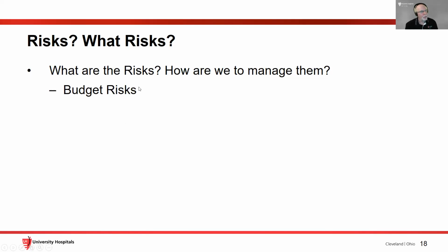But it's just a matter of having a very good handle as early as possible to understand what the budget needs to be and to mitigate the risk of going over budget, again, simply by being as well ahead of the curve as we can, making purchase decisions as early as possible. We've already got our network gear in the pipeline because we were worried about price increases and shortages. So things like that help with keeping the budget in line.